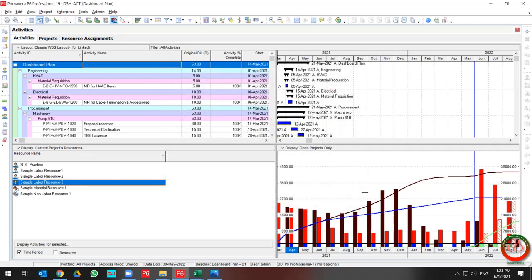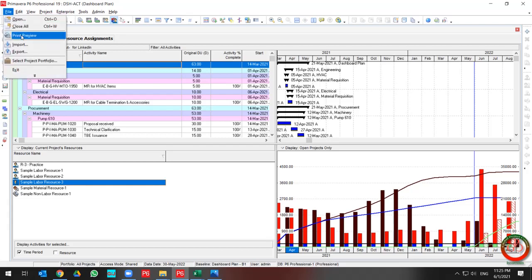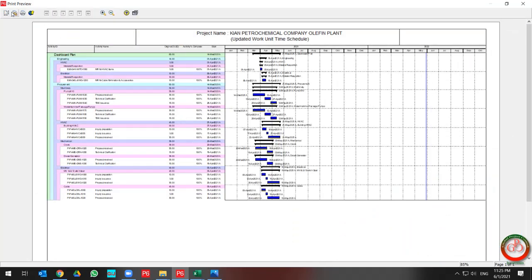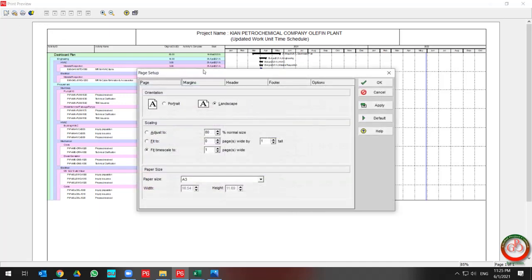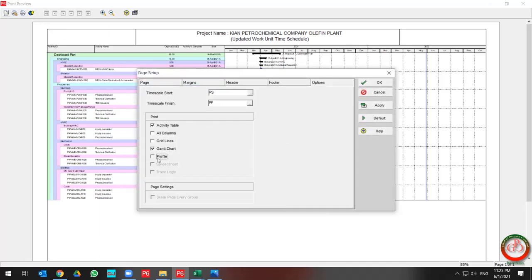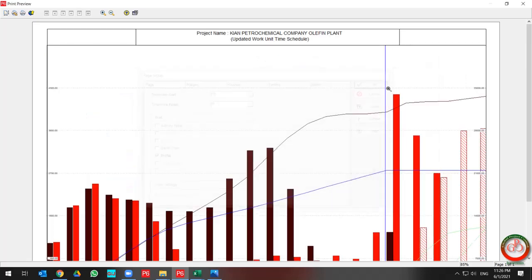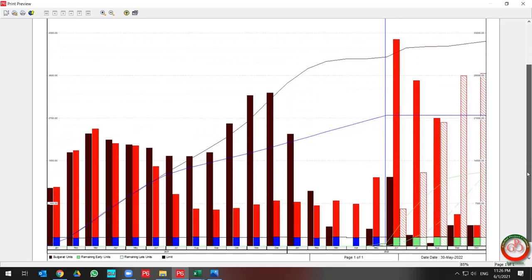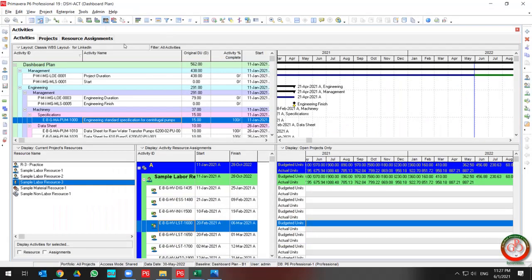If you want to create this curve in a suitable format, go to File, then Print Preview. Select the options, go to the Print option, and select the Profile. This gives you the S-curve for cumulative data and monthly data based on your project information.